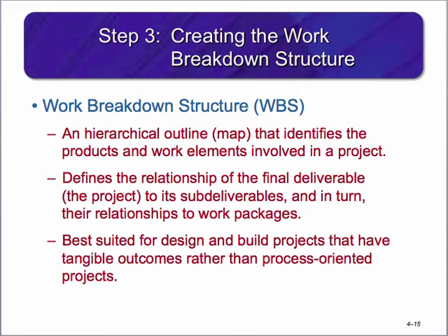The next step is to create a work breakdown structure. But what is a work breakdown structure? In very simple terms, it's a map of the project. It's the process of defining the relationship of the final deliverable, the project, to its subdeliverables, and in turn, their relationship to packages. Work breakdown structures are best suited for design and build projects with tangible outcomes rather than process-oriented projects. It's a hierarchical breakdown of the work to be done by the project team.